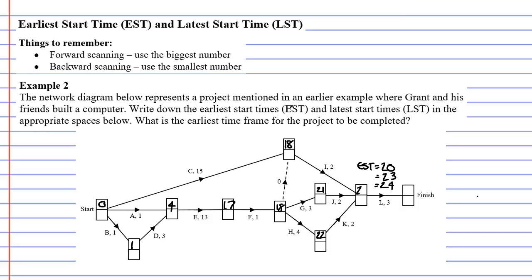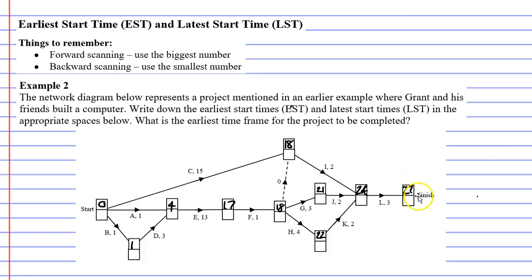We write down the largest number, which is 24. Then finally, activity L — where everything has been installed and we can screw the cover on the case — takes three minutes but has to wait at least 24 minutes. So 24 plus 3 gives us 27 for our finish vertex. The earliest time frame for completing this project is 27 minutes to build this computer.